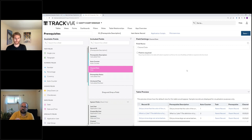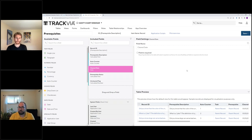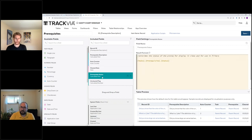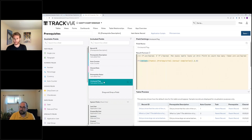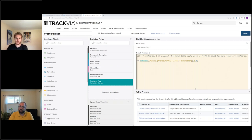By using a script, we front-load that work — each time someone saves a task, the script runs and stamps the clear date into the prerequisites table. This keeps the calendar views snappy because they don't have to recalculate chains of dependencies on open. I also pull down the status field for conditional formatting, and there's a field that flags whether the prerequisite task's actual completion date has been set — a one or zero — so we can roll up how many prerequisites are still unclear.